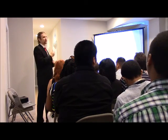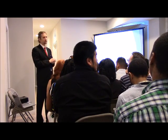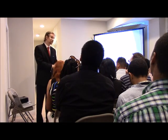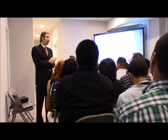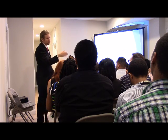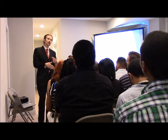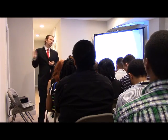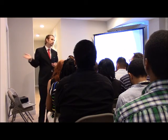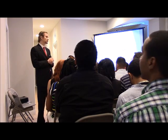The way that we're scheduling is, hey, Mr. HVAC person, you have to have this done because I have the inspection on this date. If you don't have it done by this date, I'm not going to be able to pay you, because we have to have this inspection done before I can pay you. So it's a way to keep guys motivated and on the payment schedule, because I already have all of our inspections ordered for the entire process as soon as we started the project.